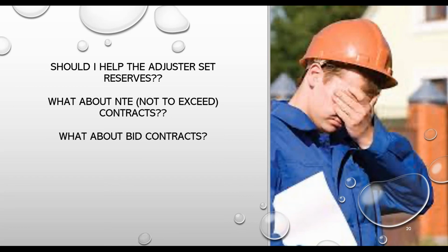There are some companies, and it used to be pretty common, to do the drying part of a job by square foot pricing. But that scope of drying was limited. It was limited to air movement, dehumidification, and the setup of those things. And for that, you would do it at X dollars and cents per square foot for the initial drying. If you're experienced in that area and can do that, that's one way of giving a contract bid on the drying.